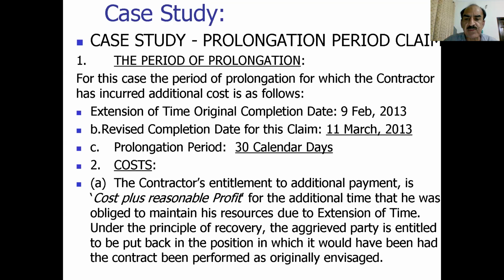For the additional time that he was obliged to maintain his resources due to extension of time, under the principle of recovery, the aggrieved party is entitled to be put back in the position in which he would have been had the contract been performed as originally planned.